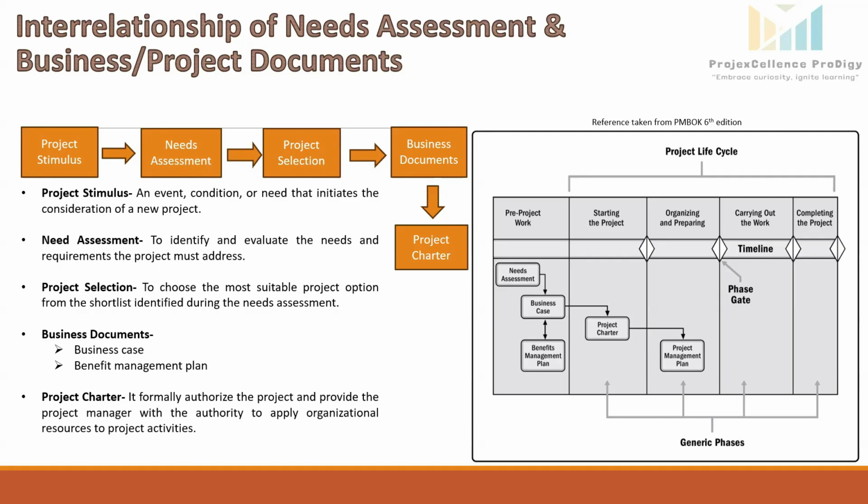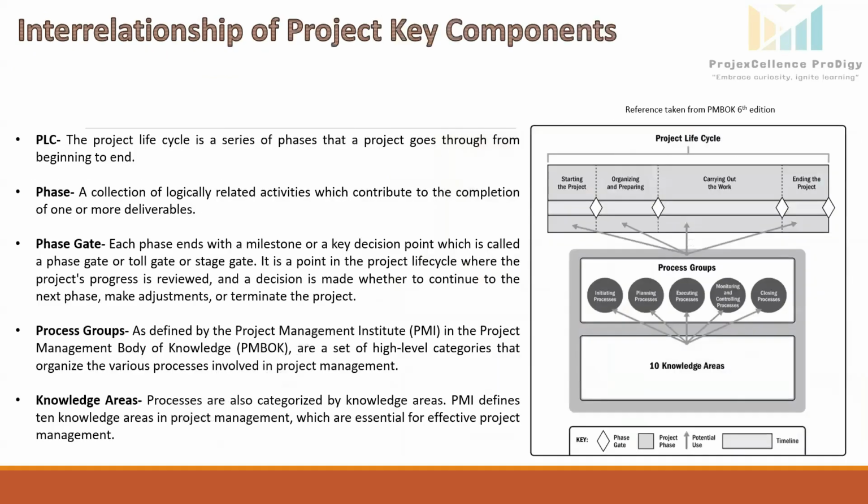The project charter formally authorizes the project and provides the project manager with the authority to apply organizational resources to project activities. So from the project charter onwards, whichever documents are created will be called project documents.